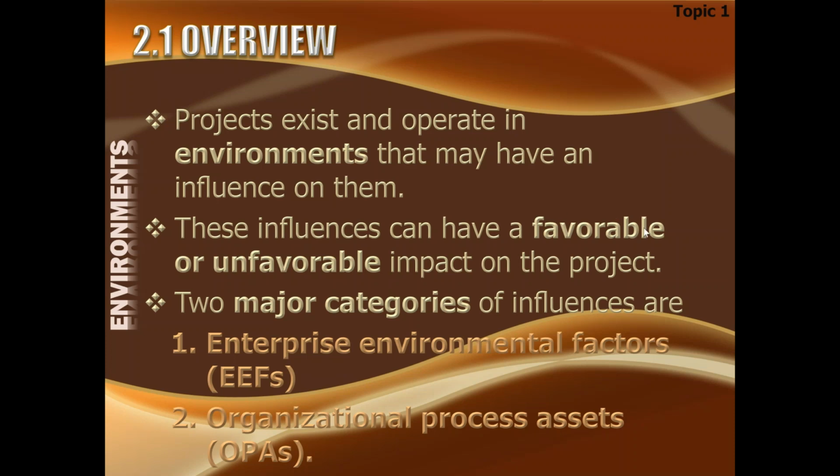Yeah, exactly, Shazad. These are lessons learned. Not only lessons learned, but in addition, lessons learned is one part of these archives. There could be a lessons learned database. There could be a risk database, a register database. There could be many other databases or many other files and folders which are keeping the record of all these things. Old, which you can also call historical information, right?